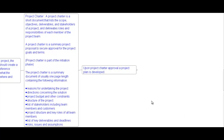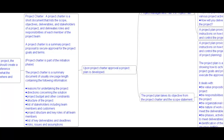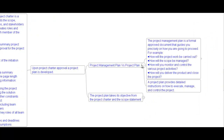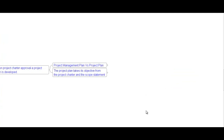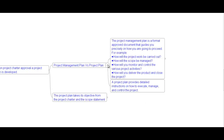Upon project charter approval, a project plan is developed. The project management plan is a formal approved document that guides precisely how you are going to proceed — for example, how the project work will be carried out, how the scope will be managed, how you will monitor and control the various project activities, and how you will deliver the product and close the project.